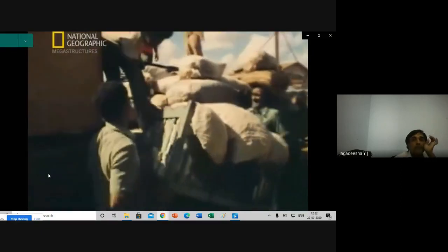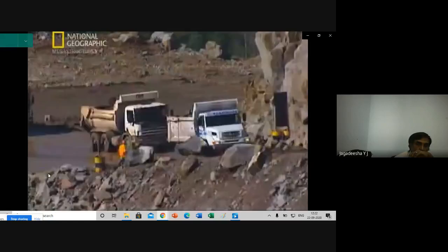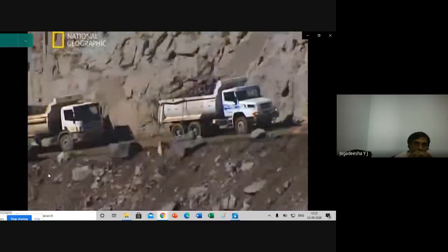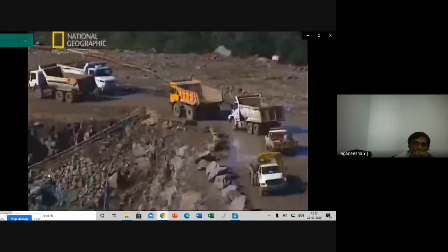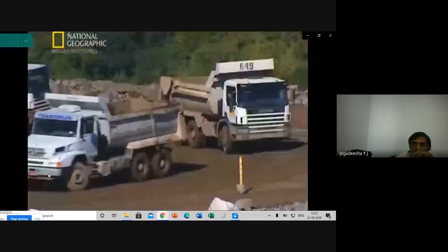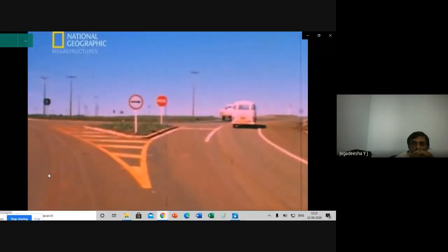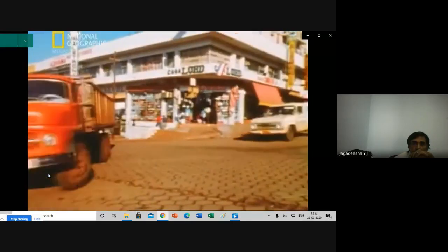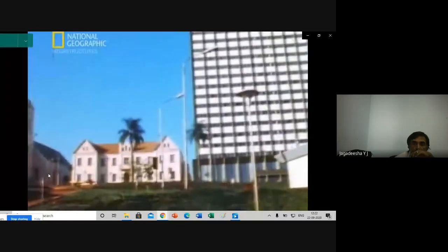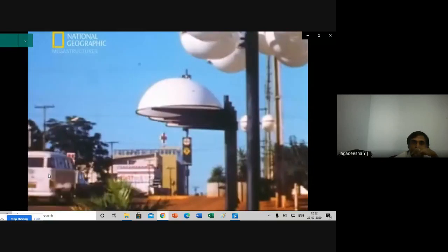Offers of compensation were rushed out. Most were accepted, but a handful of people did mount legal challenges. But engineers were more worried about keeping the secondary dams on schedule. They desperately needed more workers, an army of them. Yet the Piranha Valley was sparsely populated and remote. Its only town, Foz do Iguaçu, was a small frontier settlement. The nearest big city, Sao Paulo, was 1,000 kilometers away.